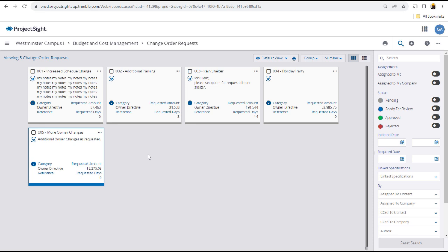The assigned reviewer approver will receive an email with a link to the change order request, where the numbers can be reviewed and approval or rejection indicated. The author of the change order request can then change the status to approved or rejected as appropriate, adding comments or links as necessary.